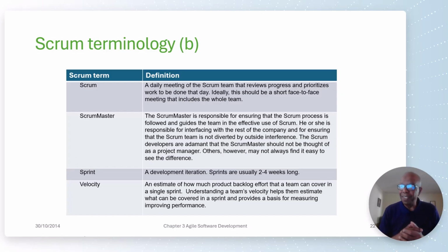Efficiency, okay. But in a Scrum team, one of the things I want you to get as far as Scrum and agile is that Scrum has a Scrum meeting every day. When you get out and get your job and you're on a Scrum team, there's a meeting every day, and in that meeting there are three things you want to make sure come out. What did I promise to do yesterday? Based on what I promised, what did I deliver? And based on what I delivered, what am I going to do today?